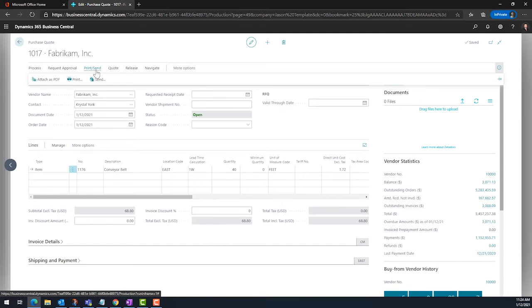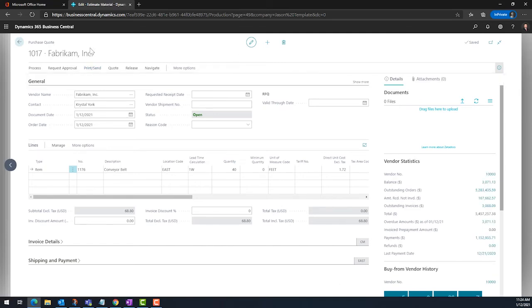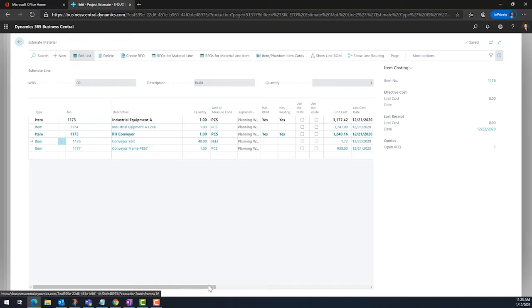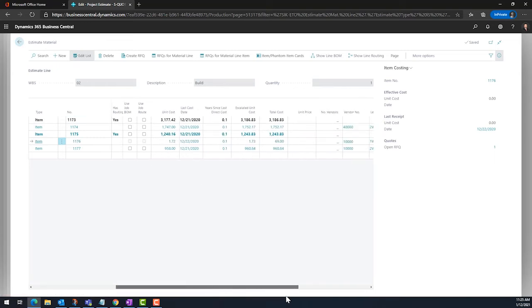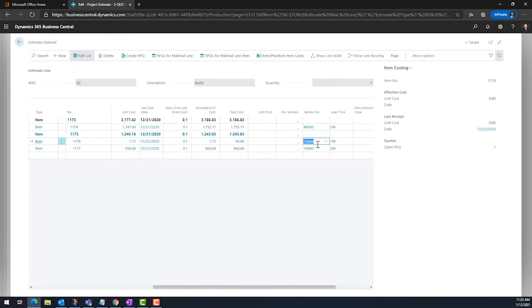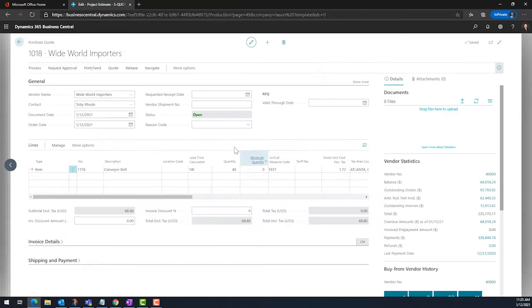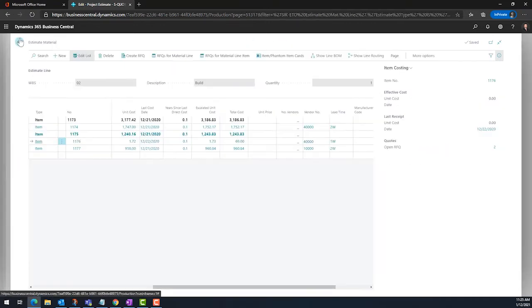Many times, pricing is needed from more than one vendor. Users will go back to the line, update the vendor, and repeat the same process that we just saw. The result on your project estimate is that two RFQs are associated with this one line.